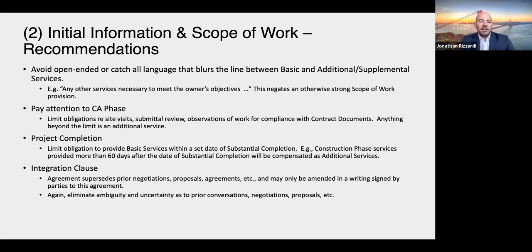And then more on the legal side, an integration clause. This is a clause that just says this is what it is, this agreement, what we've got right here. What we talked about at our informal meeting 6 months ago is not part of the agreement. What I put in a proposal to do an initial, small scope or whatever is not part of this agreement. So, again, setting boundaries, basically.